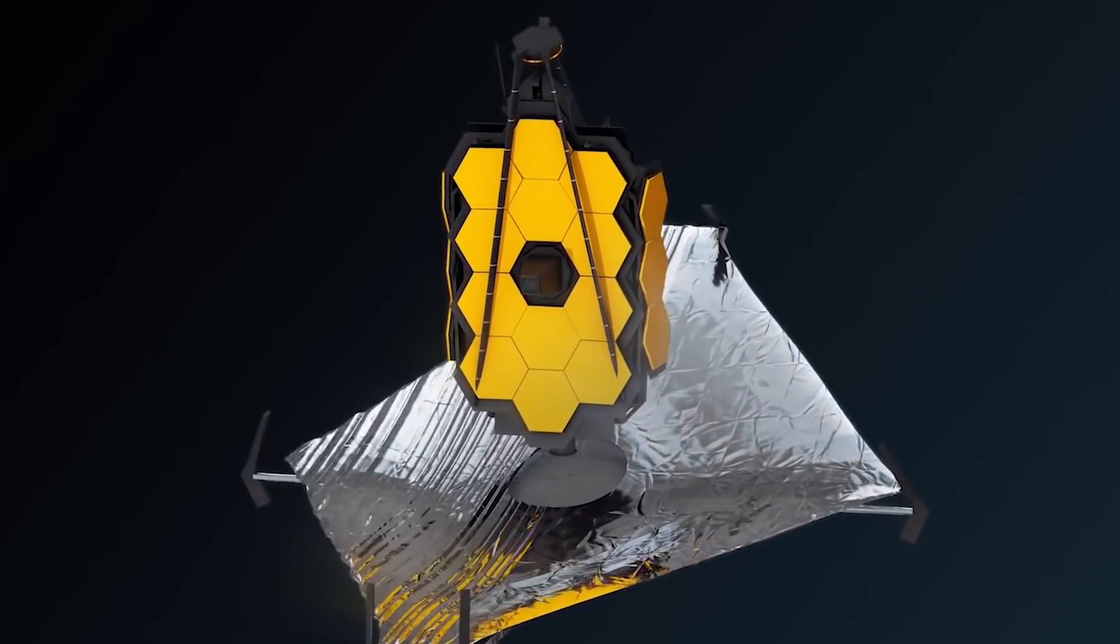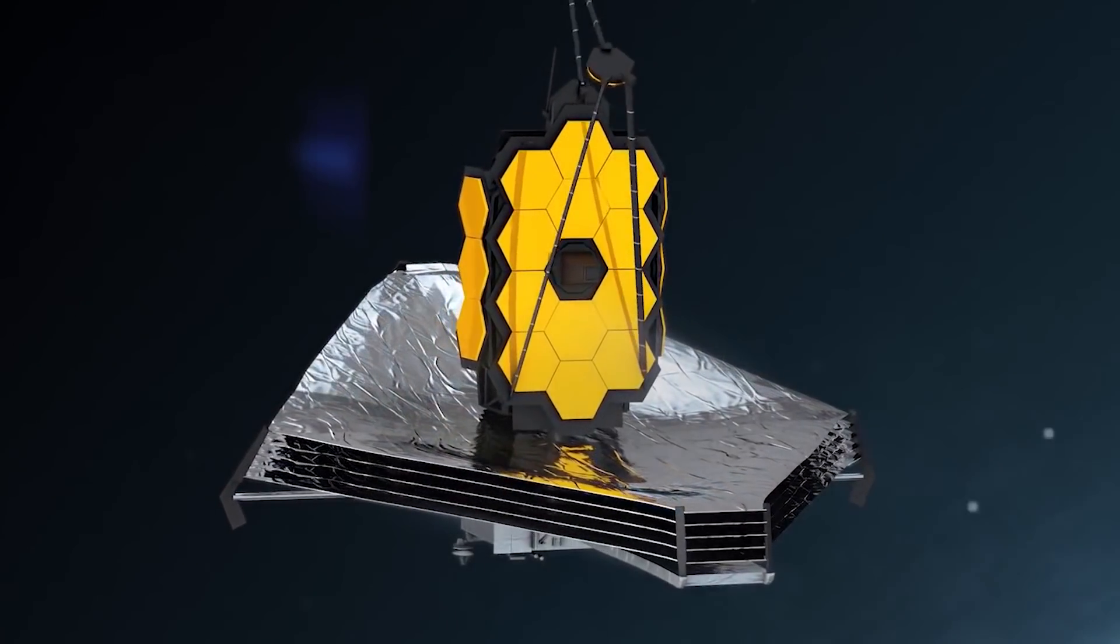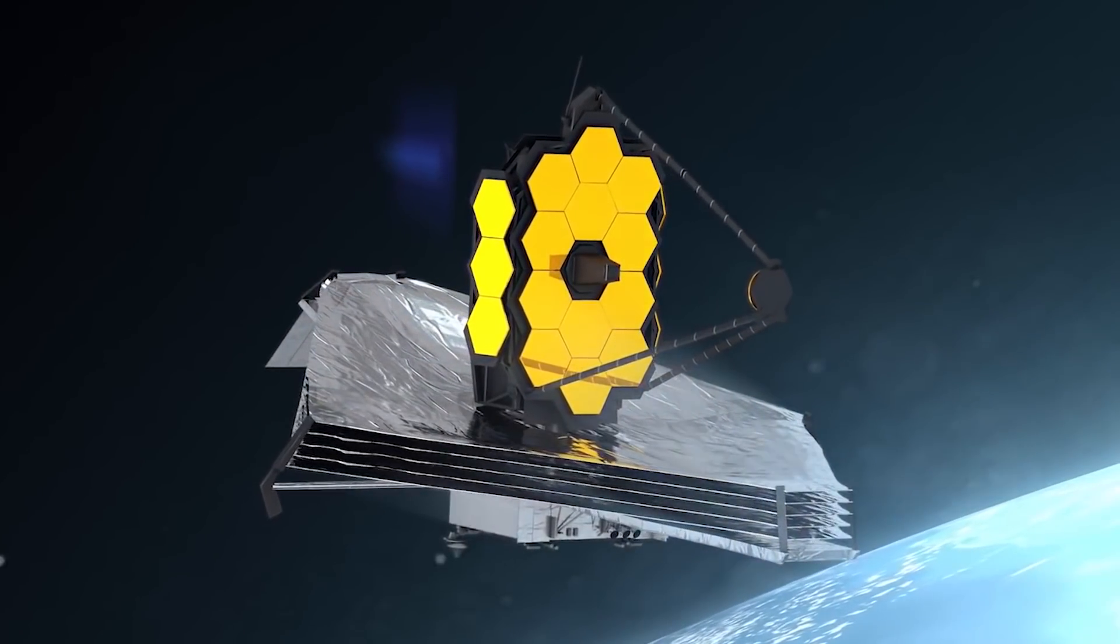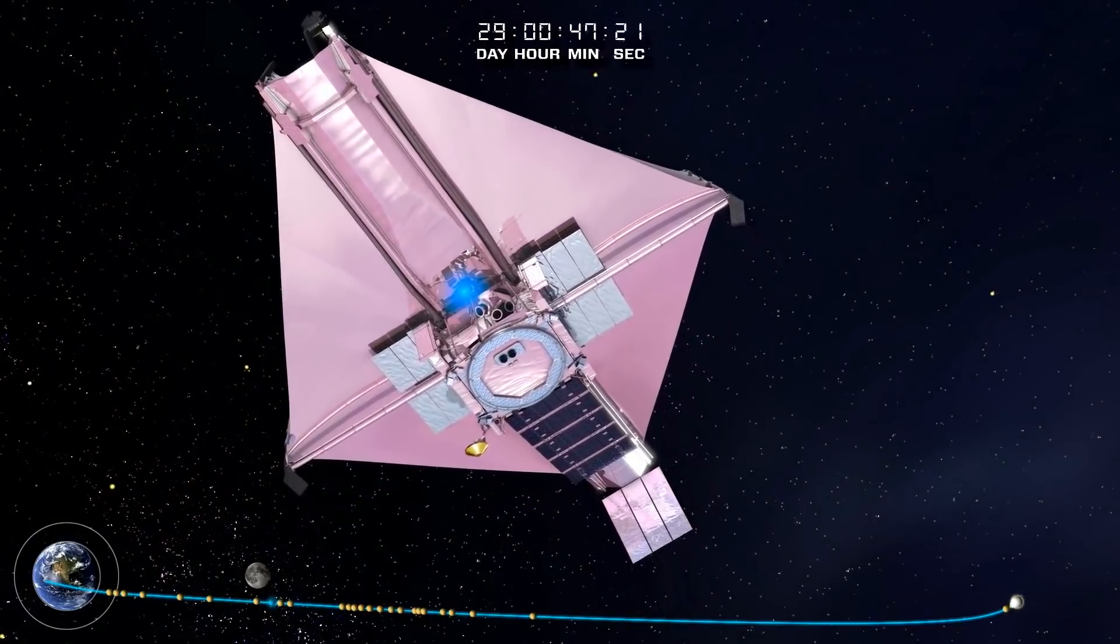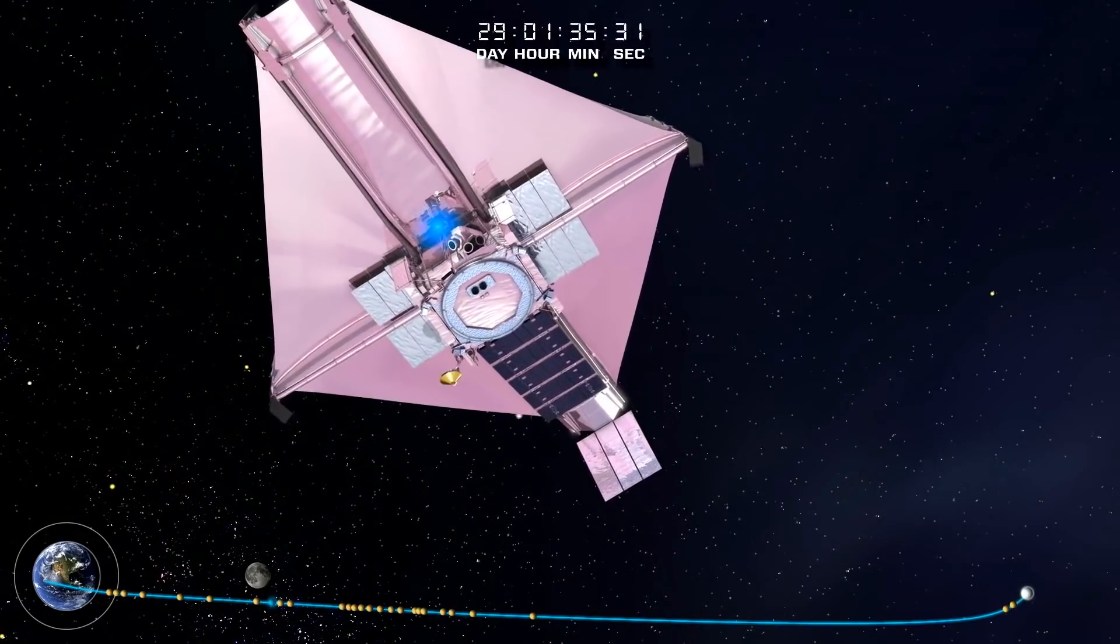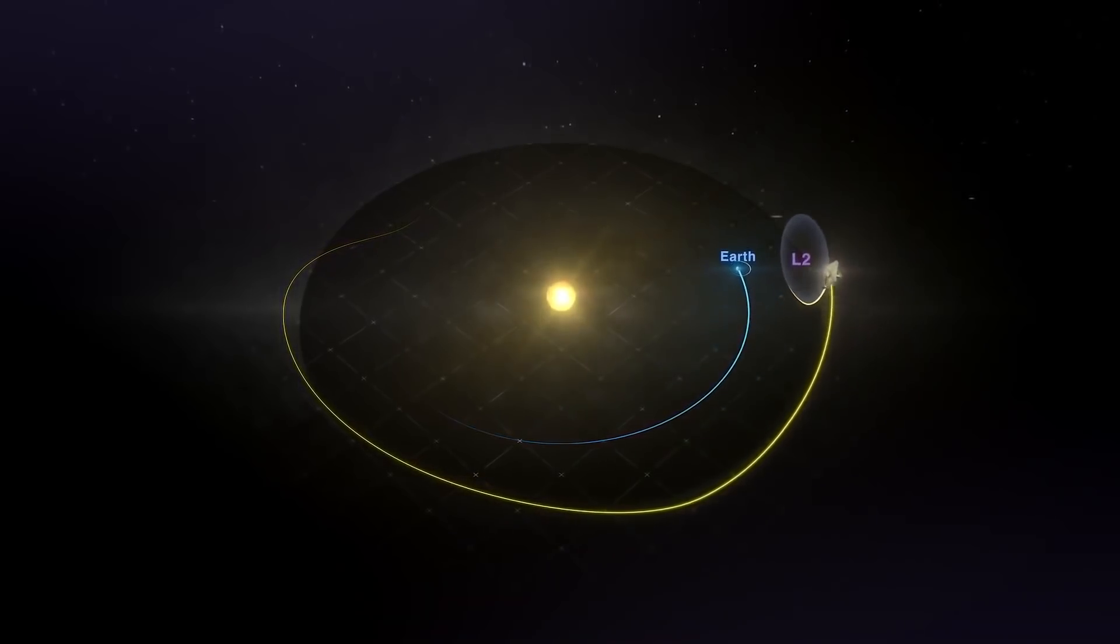The second, MCC-1B, is a shorter burn performed before the sunshield deployment is scheduled to start. The final maneuver, MCC-2, performed 29 days after launch, is designed to insert Webb into the optimum orbit around L2.